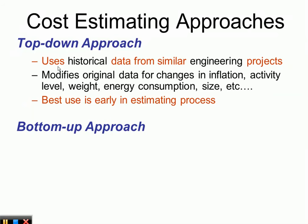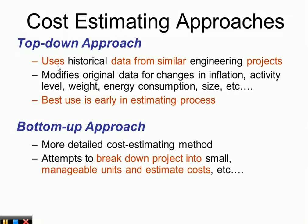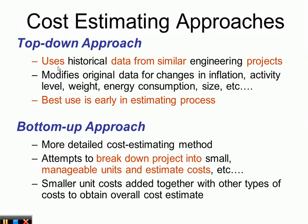The bottom-up approach is a more detailed cost estimating method. It attempts to break down a project into small, manageable units and estimate costs. Smaller unit costs are then added together with other types of costs to obtain an overall cost estimate. The top-down approach is better used in early estimation, while bottom-up is used when more detailed designs are available.